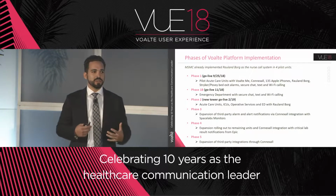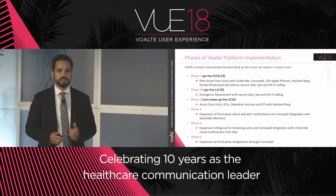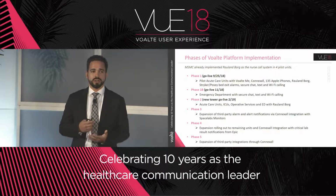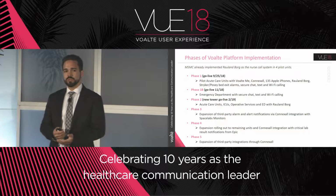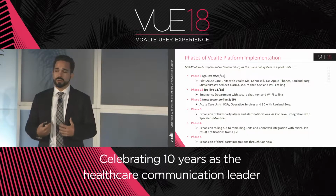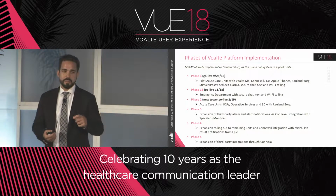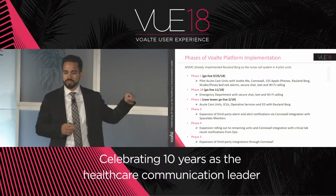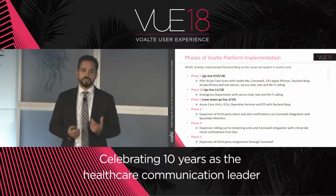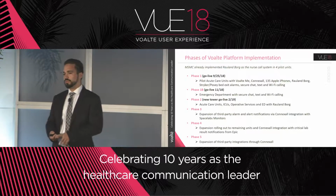With that said, we did not go big bang. We pretty much phased our implementation. Our go live last week was phase 1, which was our 4 acute care pilot units that had their roll-in system for nurse call. This way, when we went live, we already had the alarms in addition to the secure voice and text. Phase 2 is going to be our implementation of our new surgical tower, which you've seen in some of the pictures prior, which has our new OR, ICU, 3 acute care floors, as well as a new ED.